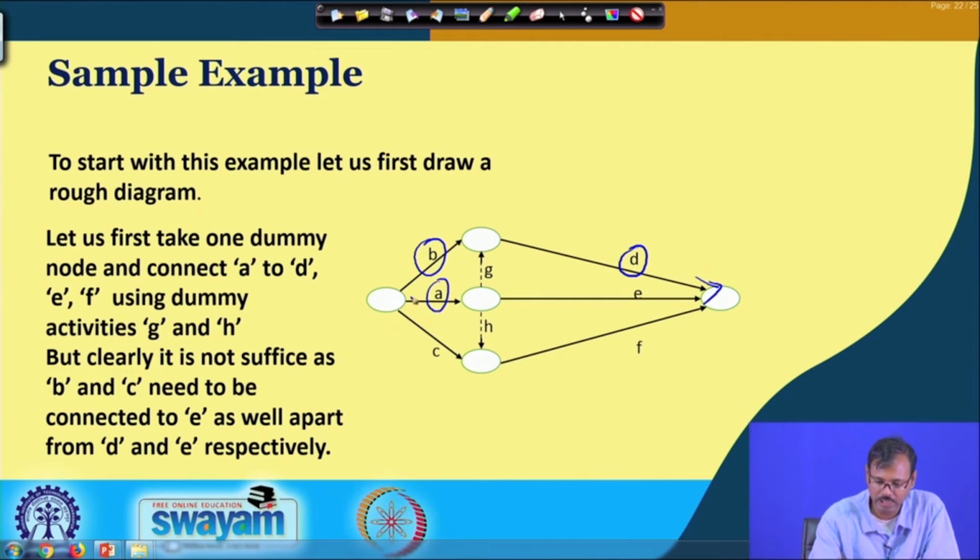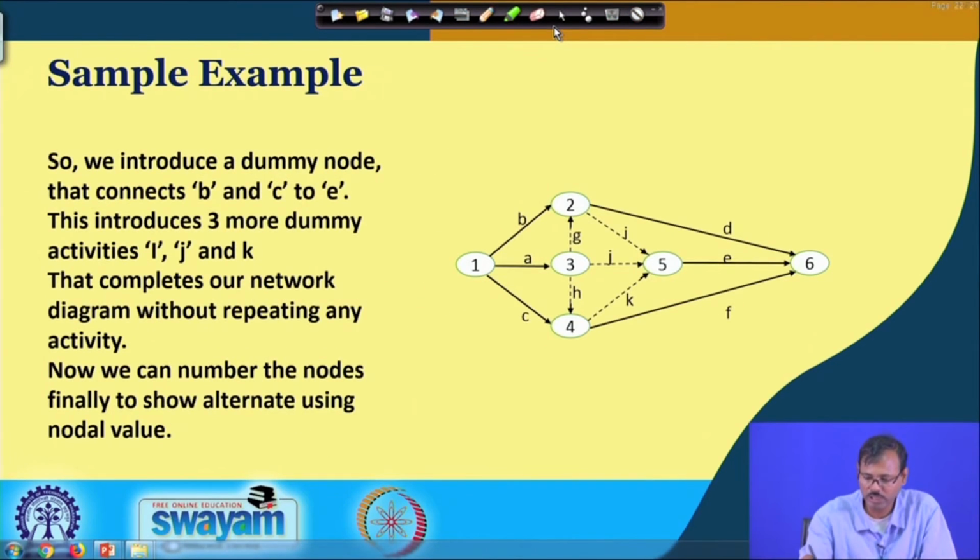So, you can see all the terminating nodes are meeting in the end and this is the starting node from which the initial jobs are started, and they are connected with two dummy jobs, so that their precedence is well accepted using this fifth node at this position.